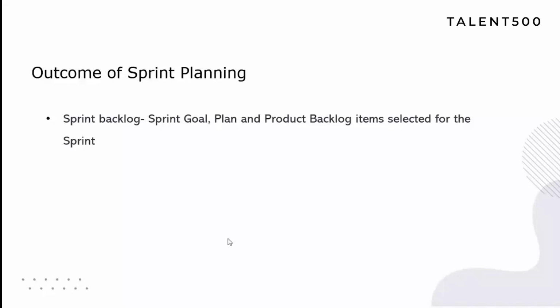During the time of sprint planning itself, have enough items to start work on and have enough details in those items, and you can pick the work as you go. But in this process, ensure that you are fixed on your sprint goal. You don't change your sprint goal according to the items. You can change your items according to the sprint goal.